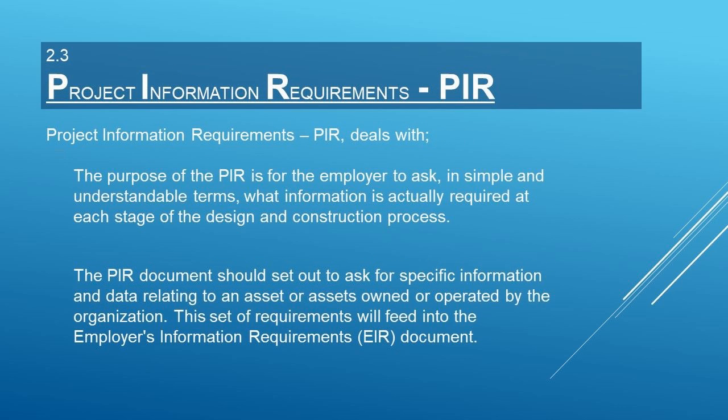Project Information Requirements, PIR, allows the employer to ask, in simple and understandable terms, what information is actually required at each stage of the design and construction process. The PIR document should ask for specific information and data relating to an asset or assets owned or operated by the organization. These requirements will feed into the employer's information requirements, EIR document.